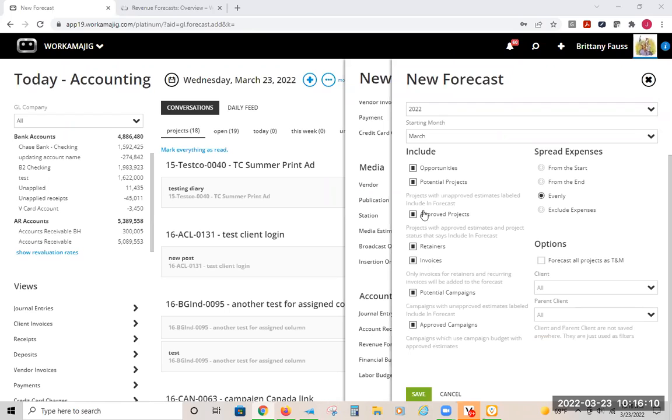If you don't have billing schedules, typically those don't pull into the revenue forecast. If I have a billing schedule that evenly says, okay, for the next 4 months, we're going to bill it 25%, then it's going to be 2,500 over the 4 months that it spans. And that's how it works for fixed fee, whereas time and material would look at the schedule.